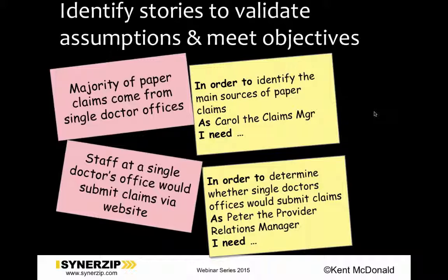So a very good way of validating that particular assumption is to build a very small version, a very lightweight version, of a means of collecting information over the web, release it out there, and see if people actually use it. This is the idea embodied in the concept of the minimum viable product in lean startup circles. It's the idea of asking what's the smallest thing you can do to learn more about the problem and the solution that you're trying to satisfy. And by doing that, you're not just hearing what they say they might do, but observing real action and what they can actually do.